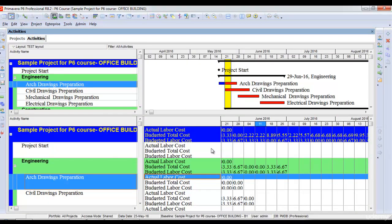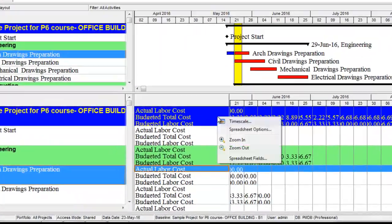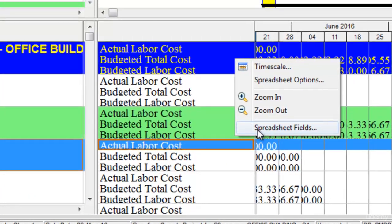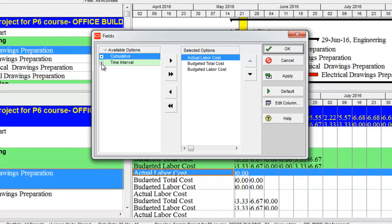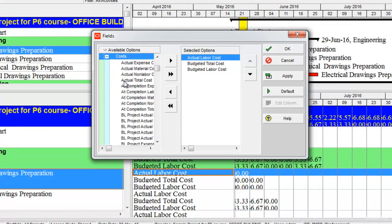In this spreadsheet I can see my actual cost, my budgeted cost, my planned value, and various other things in the form of a spreadsheet. If I right-click here on the spreadsheet and select spreadsheet fields, there are different types of spreadsheet fields which I can pull out to see. For example, under costs I can see my